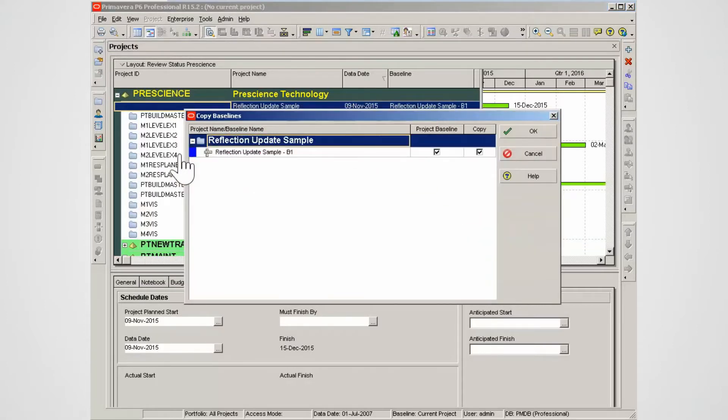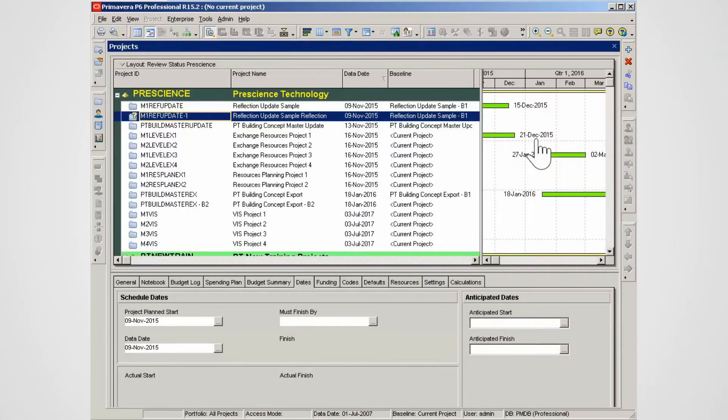Note the option to copy the baseline. Select OK to start the process. The reflection project is created as a what-if clone linked to the source project.